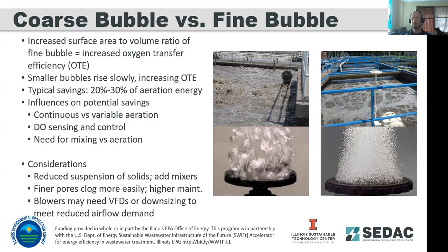If you're upgrading a full basin, smaller plants maybe not as much of an issue, but something to be aware of if you're doing upgrade projects, that there may be some additional hidden capital costs as far as requirements for supporting systems like your blowers. And usually when we write our reports, we try to include those details for you.